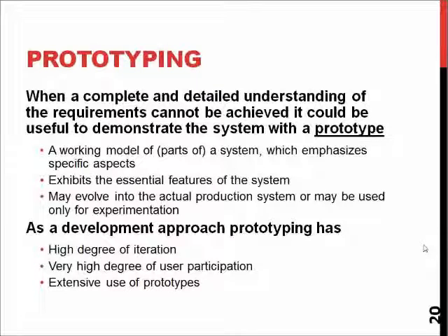And the first prototypes don't have to be that refined. On some projects which I've been involved with, the first prototypes for the user interface were more or less mock screen captures or something drawn on paper to give the idea of what the system will look like, what could happen, what the system would be doing, and how, for example, the terminal to use your smart card would look, and would it be visible enough or interesting enough or identifiable enough to be used by potential customers or employees. So, more or less, these are the things that you can capture with prototyping.